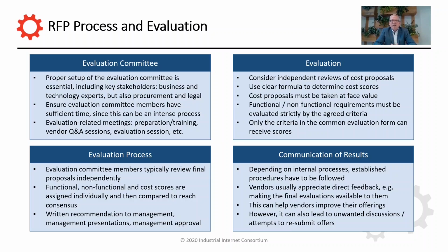In terms of the evaluation itself, especially for the cost part, depending on the size of your organization and the size of the project, it can make sense to have the cost evaluation be run as a separate process, which is independent of the evaluation of the functional and non-functional criteria, potentially evaluated by different teams or at least different people, and then use your evaluation form to merge all of this back together to get one holistic view of the results.